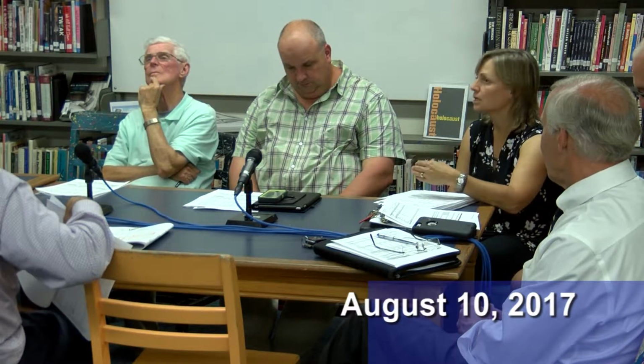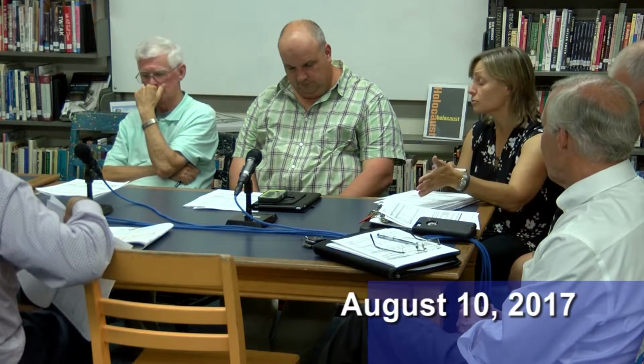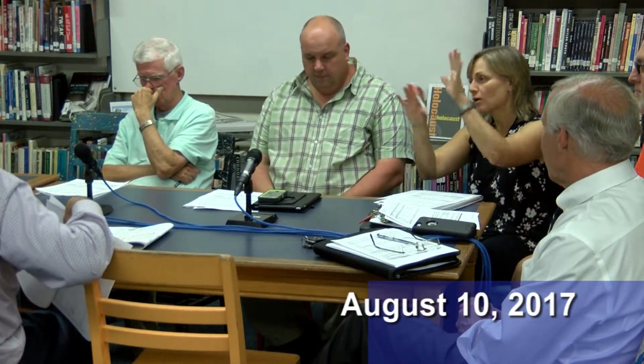We have a meeting next week to go through with Scott Goodrich, our consultant, what things we want when. We don't want all the computers all at once, but we may want them all at once in terms of how they're configured. So we'll sit down with Bill and David Lukaskevitz and Cheryl and Tim and get all of that lined up. But again, procurement will be in early fall. And that's on budget in terms of hitting that $1,200 per student mark. So that's the update with those two.